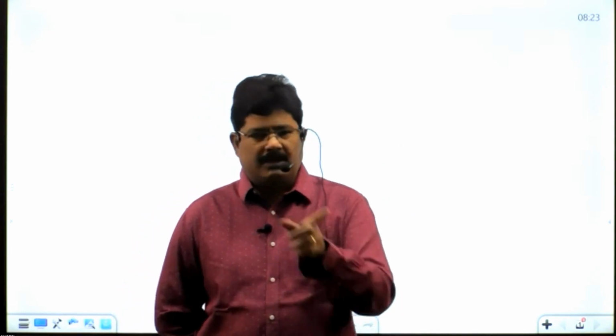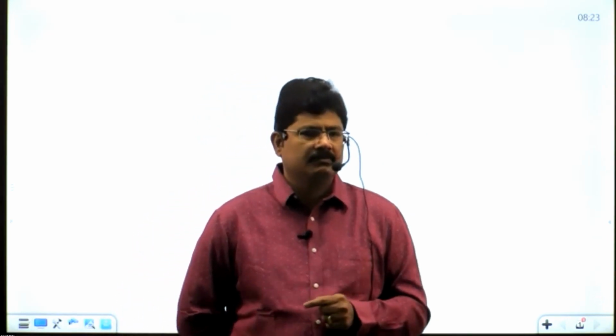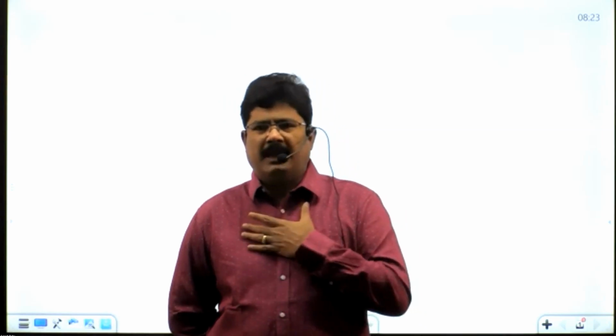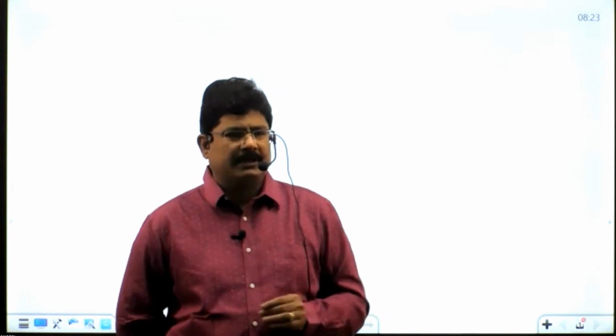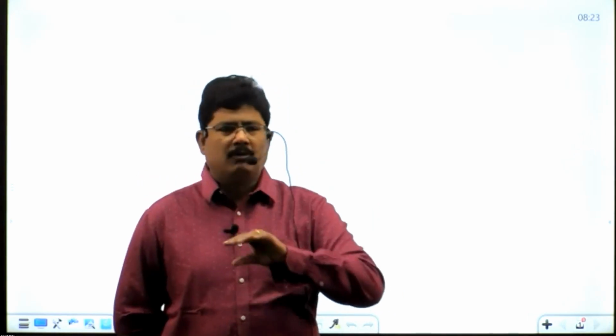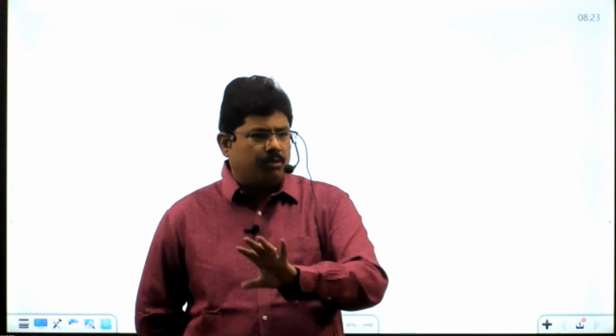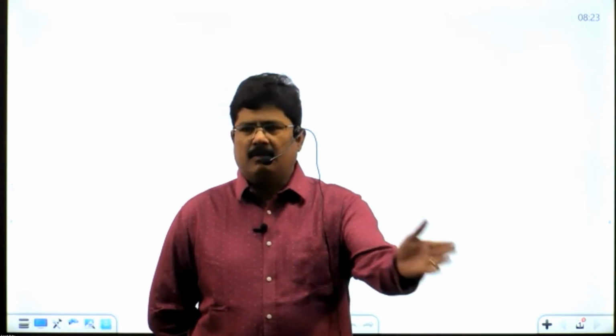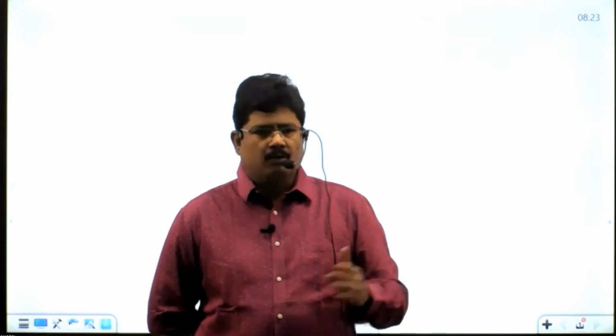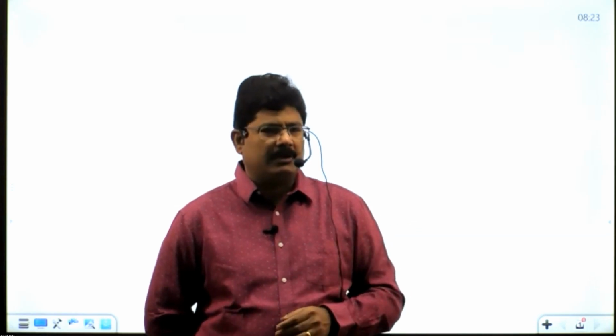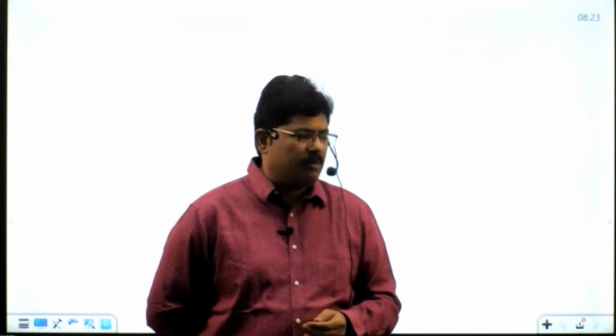In manual testing, this is your day-to-day routine job. Say I am the lead for this project. Totally 40 requirements need to be tested in the project. Four people are involved in testing this project. Say I plan that in the first schedule, we test these 4 requirements, in the first 1 week. I'll assign the work to my team members. You write scenarios and test cases for requirement 1. You write scenarios and test cases for requirement 2, requirement 3, requirement 4.